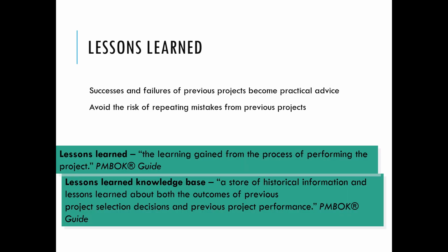A learning gained from the process of performing a project is called lessons learned. Successes and failures of previous projects become practical advice for the current project. It helps us avoid the risk of repeating mistakes from previous projects. The PMBOK framework strongly suggests that we create a lessons learned knowledge base, like a store of historical information and lessons learned about both the outcomes of previous project selection and the decisions and previous project performance. What happened and how, what was the impact and how can it be mitigated? What is the cost of it, etc.